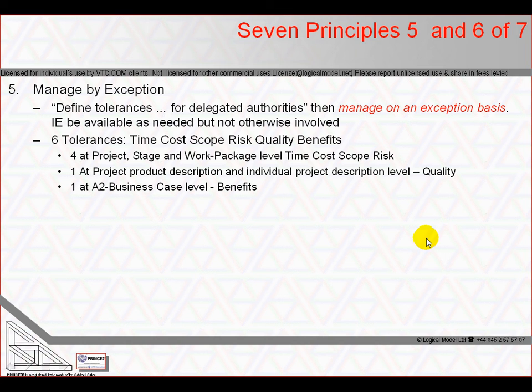Delegation of authority from one management level to the next must set limits, both plus and minus, on the allowable variation in completion date, resource usage, conformance to specification, inclusion of required elements, degree of risk, and ability to deliver benefits.